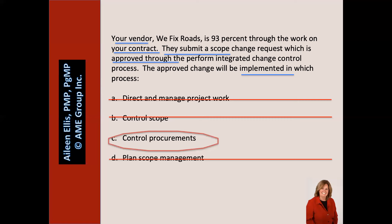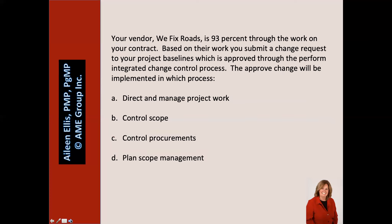We're going to look at a second question — a similar question, though the answer is different. Your vendor, We Fix Roads, is 93% through the work on your contract. Based on their work, you submit a change request to your project baselines, which is approved through the Perform Integrated Change Control process. The approved change will be implemented in which process? Pause the video and answer the question.